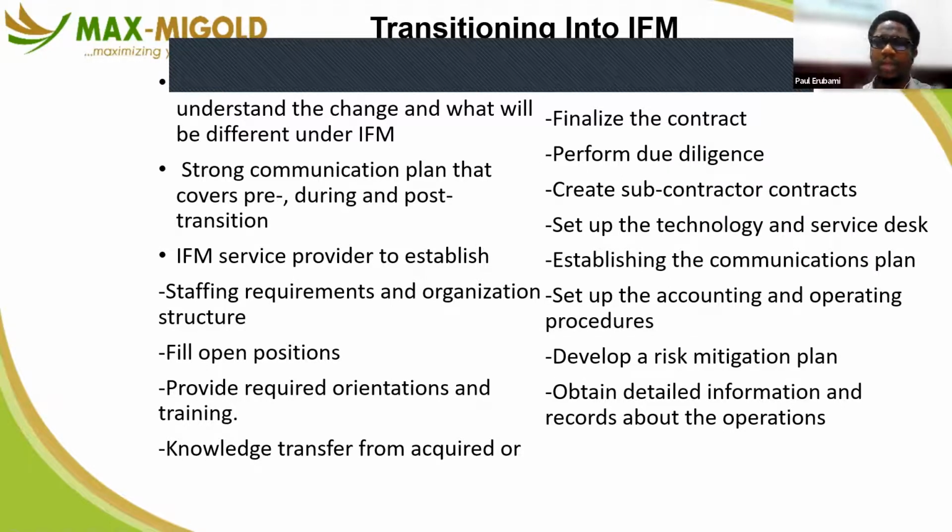So it's not enough to want to outsource and then just look for people who will come and scope and take over your job. You need to look at this list carefully, including a risk management plan. What can go wrong? Just brainstorming in syndicate sessions, what can go wrong with your team, and coming up with measures and documenting all of these things.